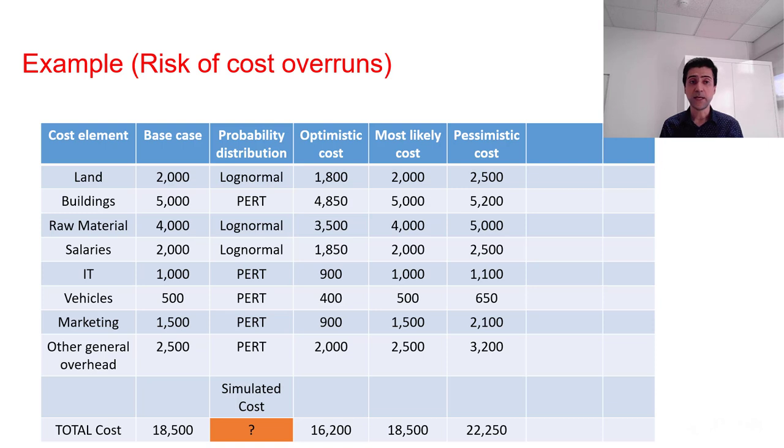For other cost centers, such as buildings, a PERT distribution has been used. And we understand that based on the static or non-stochastic calculations, the base cost of the project is 18,500. But we want to combine those costs under different statistical distributions and find a stochastic result.